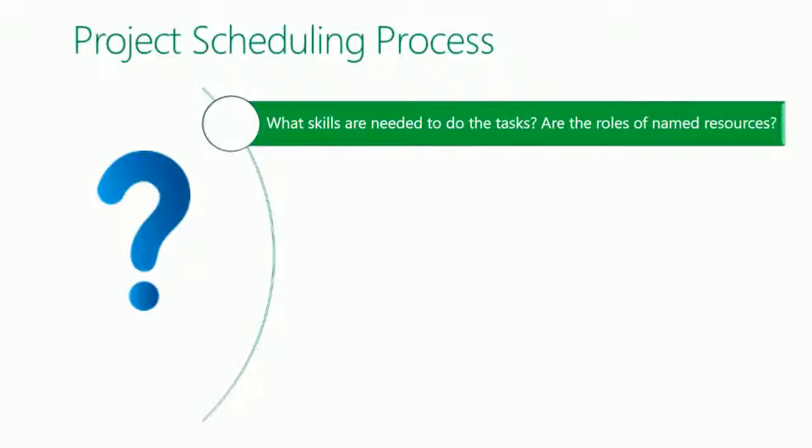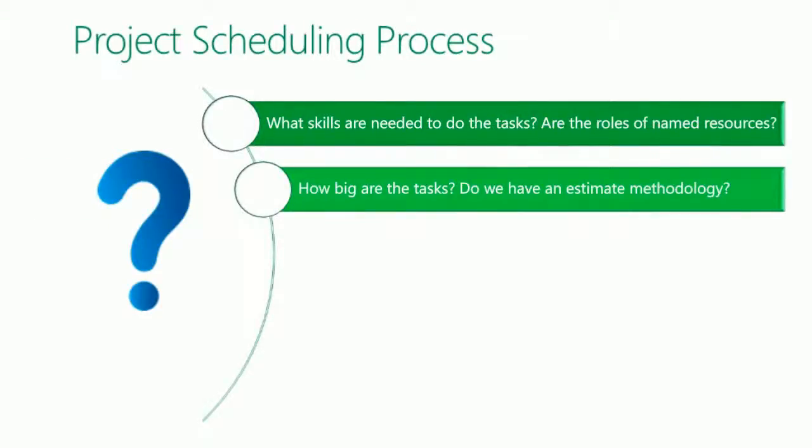How about how big are the tasks, right? I alluded to this earlier about how many tasks should I have? What kind of rules of thumb do we have? I hate to see 800 tasks, but there are certain kinds of complex projects that have 800 tasks. So how do we do the right sizing? And there's some rules. The rule of 40 I heard when I was at IBM, professional services, 25 years ago. We tried to get them into weekly packets, if you will. Going deeper than that created a lot of updates. And we were doing it on paper originally, and even that was a little bit easier in some cases than using this technology and seeing how fast it changes everything.